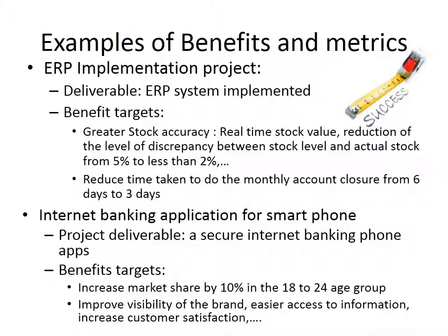Loosely defined, a benefit can be worse than not having a benefit, in the sense that if you give, for example, improve the efficiency of the whole department, yes, that's maybe an objective, but what is the actual benefit? What is the actual value that we want to achieve? So try to be much more specific. Are we looking at efficiency in terms of speed of processing a transaction? Are we looking at efficiency in terms of cost saving? Are we getting right to the metric level?